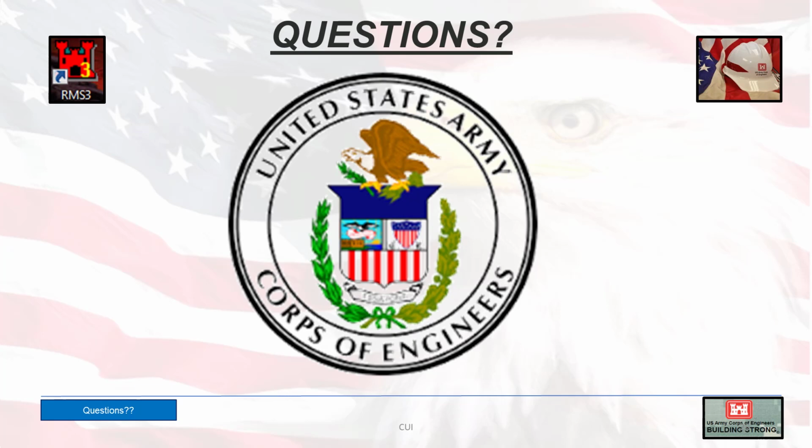Does that answer your question? You are correct. RMS is not requiring a signed version at this time. However, in the upcoming releases, that will change. Basically, when you click on the send to CEFMS, it will have you sign it at that time. So just be aware. Right now, we don't force it, but CEFMS is going to start implementing those reinforcements. And if it gets sent to CEFMS and comes back with an error, it's because it must be signed by at least one person.